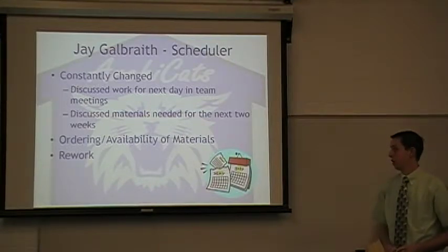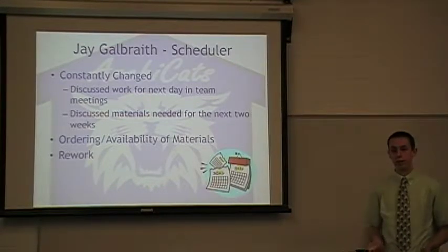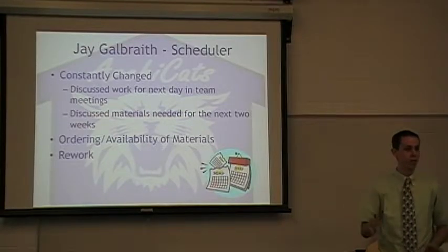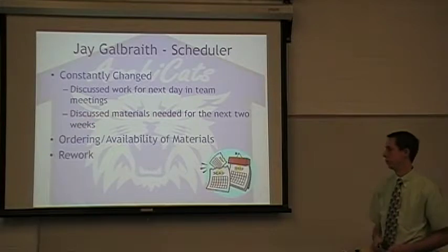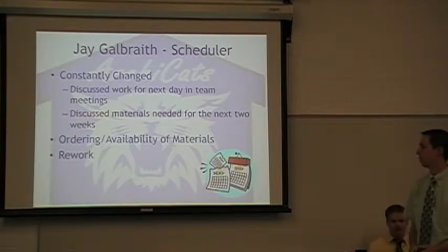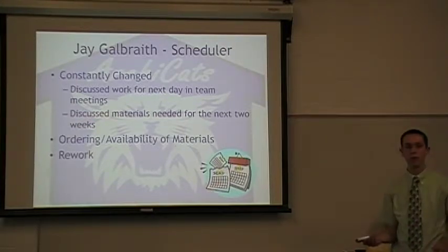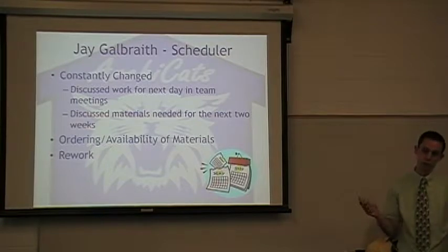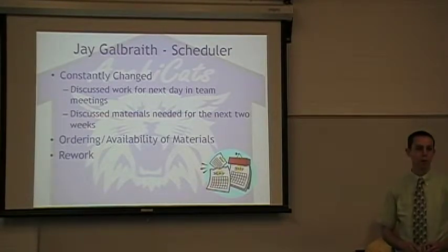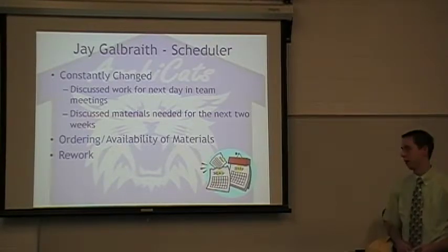The schedule also changed a little bit depending on the availability of the materials and how we were ordering. Some things took a little bit longer to get, so we revised the schedule trying to incorporate those conflicts. And then we also didn't have too many reworks. We had one or a couple of fairly large ones that set us back a week or so, but we were able to recoup that time a little bit later on.